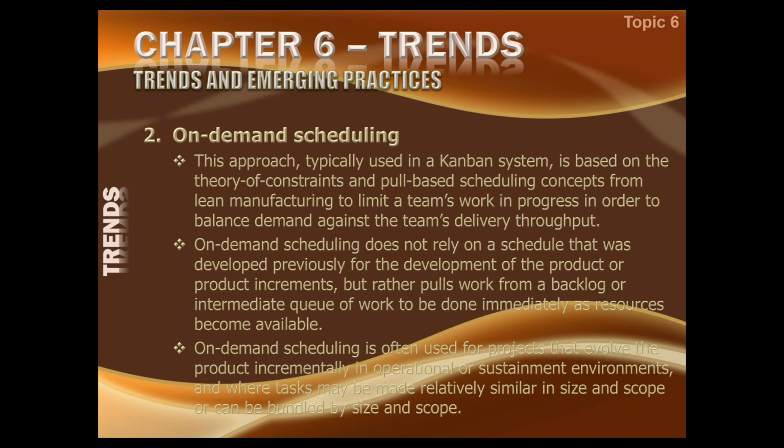So it is also based on a backlog, but unlike in sprint or scrum, we do not take 10 jobs to the sprint backlog, but we will keep pulling the work. We will pick 1-2 jobs at a time, and when they are completed, we'll pull another and then another, then another. So that way we will keep pulling work when we are free. So that way we can be most effective. We do not have a sprint backlog with us all the time. So we'll directly be pulling from the backlog of the project.